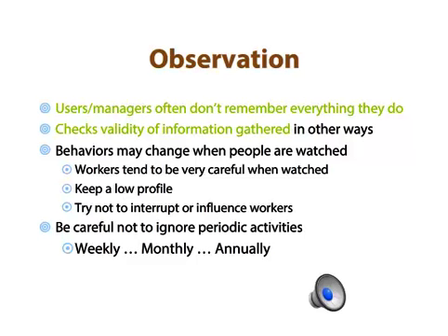Another technique that we use to gather requirements is through observation. So we shadow the users, and people that we talk to won't remember all the details of what they do, so for some really key processes, we will just sit with them and follow them around for a day or two. That really gives us a good idea of how they conduct their job and what we need to incorporate in the new system.